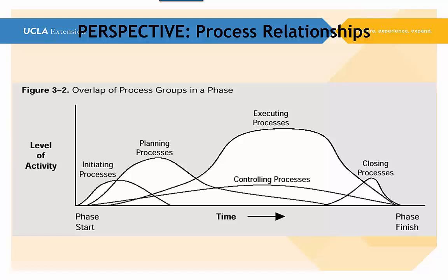We have to start looking at, we're staffing down our project team, as you can see from the executing processes. They're dropping off, which means the activity is dropping off. With the activity dropping off, that means we're probably releasing people. What are we doing about that? That should be part of our closing processes. We should make sure that the individuals have a heads up when they're going to be released, that we talk to their managers. We make sure that they have work to go to or another job or another task.